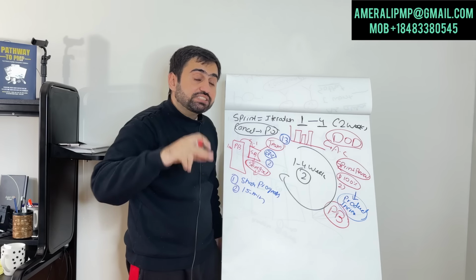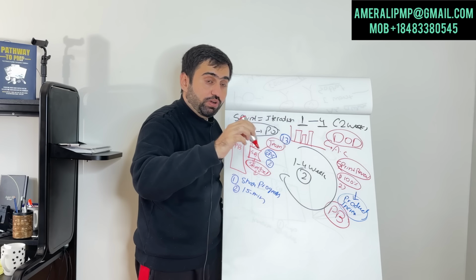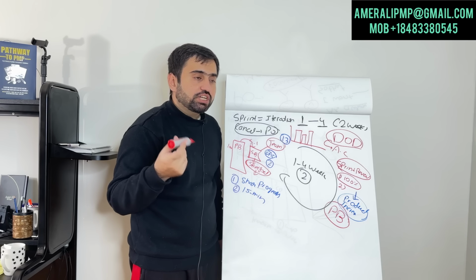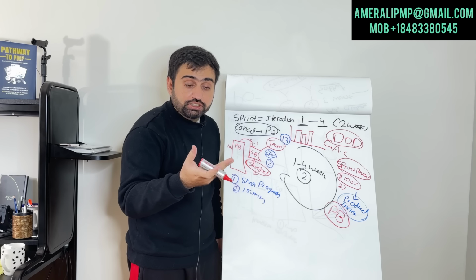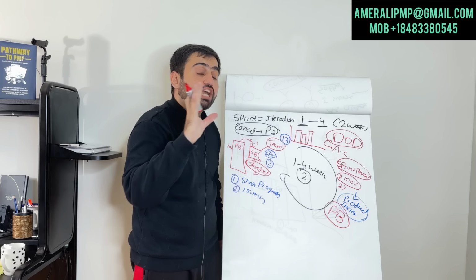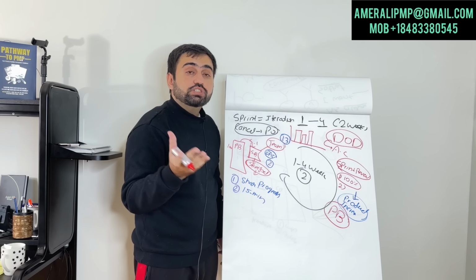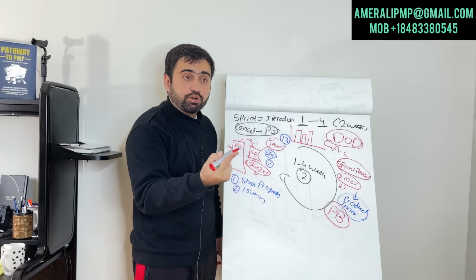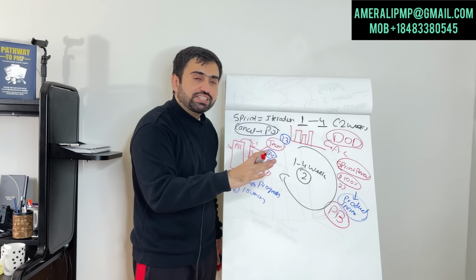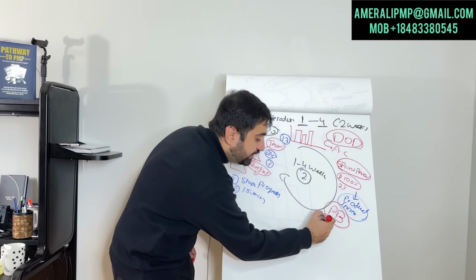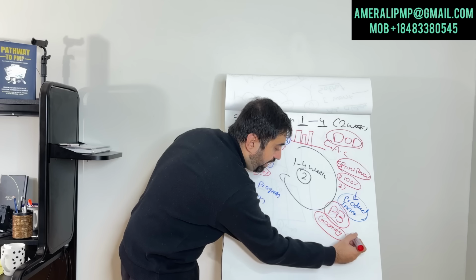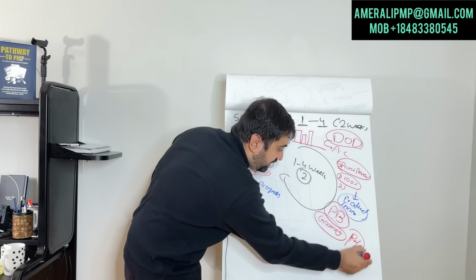This is the best time where the client can add new requirement. You see, client can actually give, because we know responding to change over following a plan is the value of Agile which we follow. They can give any time, but this is the best time when they should actually give us the requirement. So they can add new requirements that are in the product backlog, old requirement, incomplete, rejected. All the requirements are there, client is here. So I would say let's do grooming of the product backlog. Grooming or refinement of the product backlog happens here.